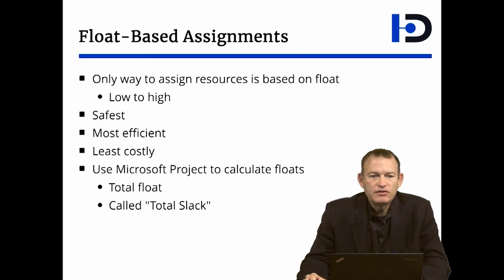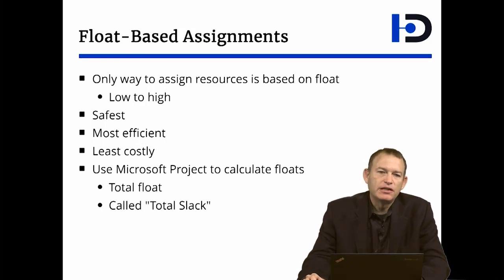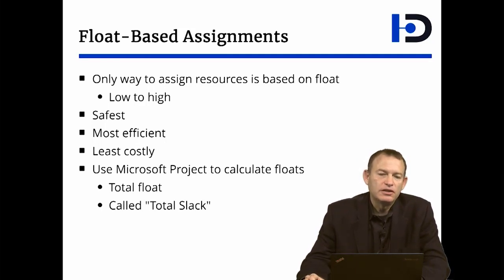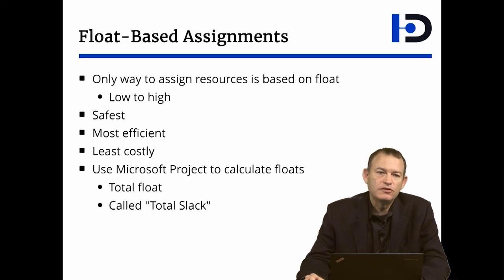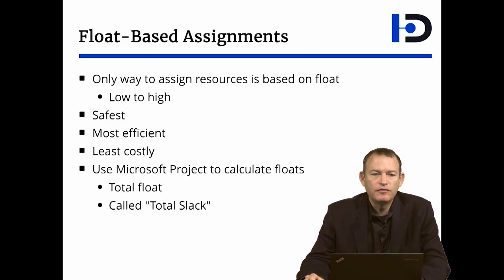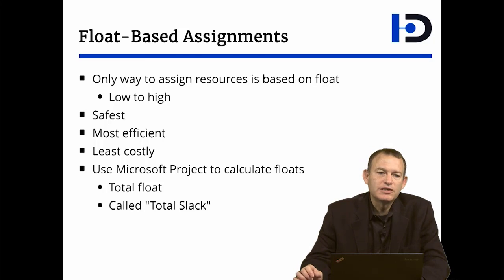By doing so, you will have the safest way of assigning the resources because the lower the float, the riskier the activity is. And so if you address those activities first, you reduce the overall risk of your project.